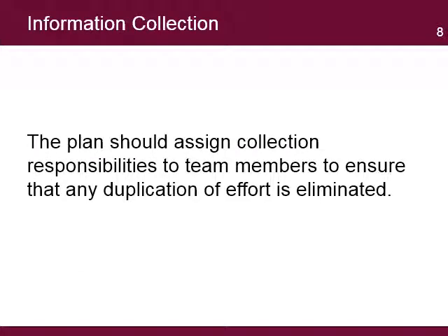The plan should also assign collection responsibilities to team members to ensure that any duplication of effort is eliminated. The plan should incorporate reporting deadlines when appropriate and establish periods for all collection tasks. It should clarify which periods include due dates that are fixed and those that are simple target dates. For collection activities that require data to be collected or reported in specific formats, the plan should either specify the format or refer to the source documents that provide information.